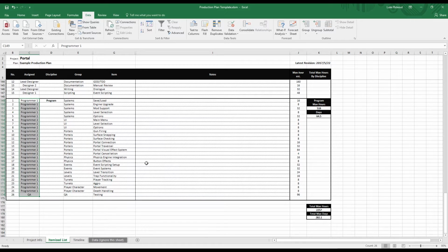This can be a few days' work, but ultimately, after each task has a man-day cost associated with it, we can see the total man-day and man-month cost on the project. This on its own is an invaluable number to be aware of, but we need to establish dependencies before we can call our schedule ready.